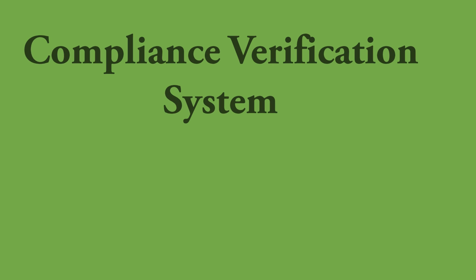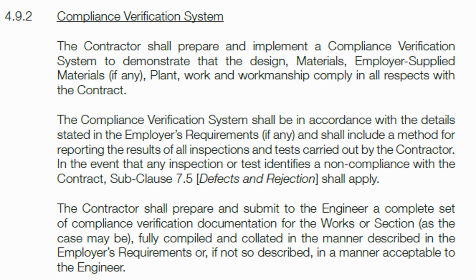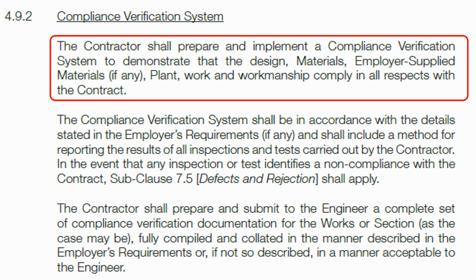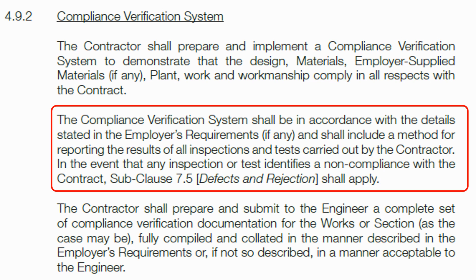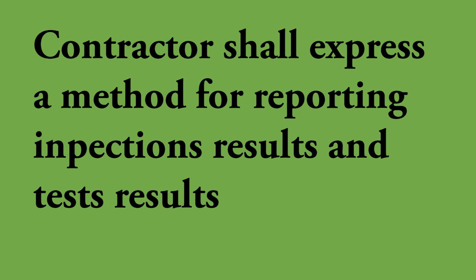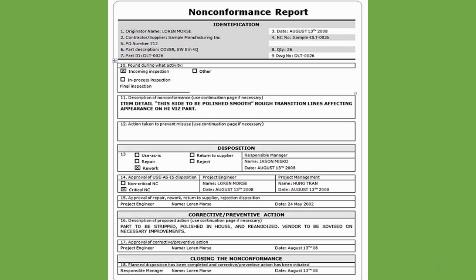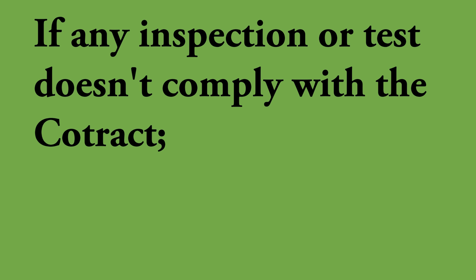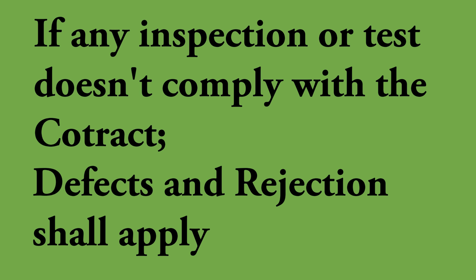Next, I'll talk about the compliance verification system. Under definitions you cannot get a clear idea about it, so I'll take you to sub-clause 4.9.2. Basically, this system is implemented to ensure that the contractor is maintaining the required quality during construction, and that all functional requirements are fulfilled. The clause says the contractor shall prepare and implement a compliance verification system to demonstrate that the design, materials, employer-supplied materials, plant, work, and workmanship comply in all respects with the contract. This system should be prepared referring to employer's requirements, specifications, and regulations. The contractor shall mention in this system how he's going to report the results of all inspections and tests carried out. You must have heard the term NCR — non-compliance report — which is issued when the contractor fails to comply with the expected quality. In the event that any inspection or test identifies a non-compliance with the contract, sub-clause 7.5, defects and rejection, shall apply.